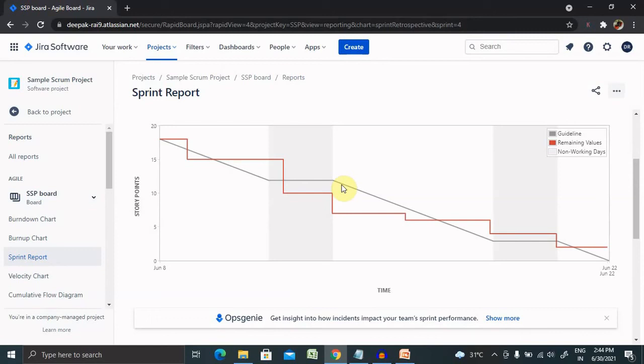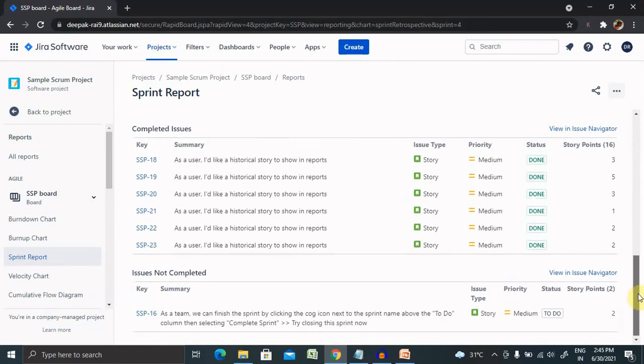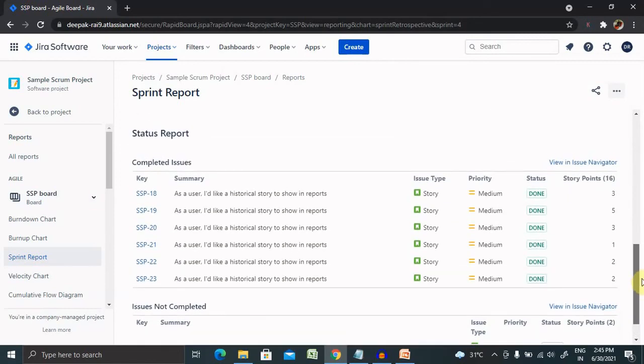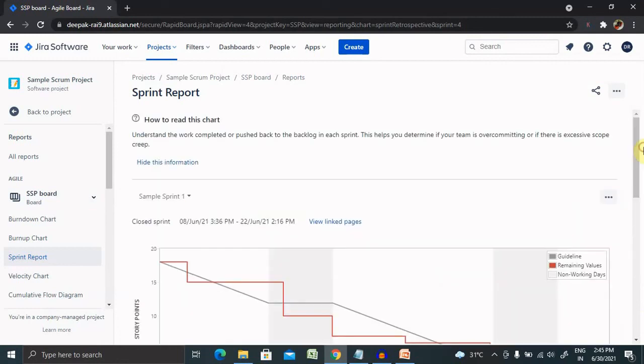If our board is configured to track remaining estimates and time spent, a green line will be displayed in the sprint report indicating work logged on an issue. This is how we can generate a sprint report and analyze our sprint report which is very important for retrospective meetings.